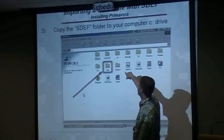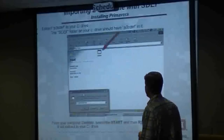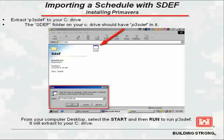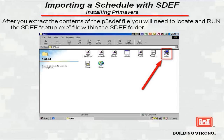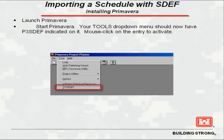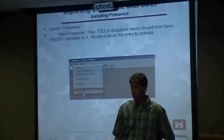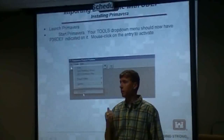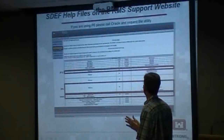Under P3, here's your folder. You can pull the SDF utility and tell it to run. It's an XDE file — you install it, go ahead and set up, and then place it under P3. There'll be a P3 SDF utility right there below. That's what you use to convert your job when importing into QCS. It's real simple in P3; in P6 I'm not real sure about everything.